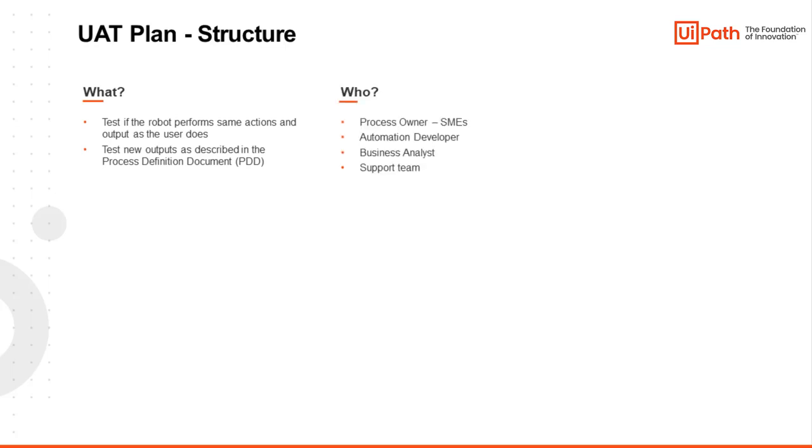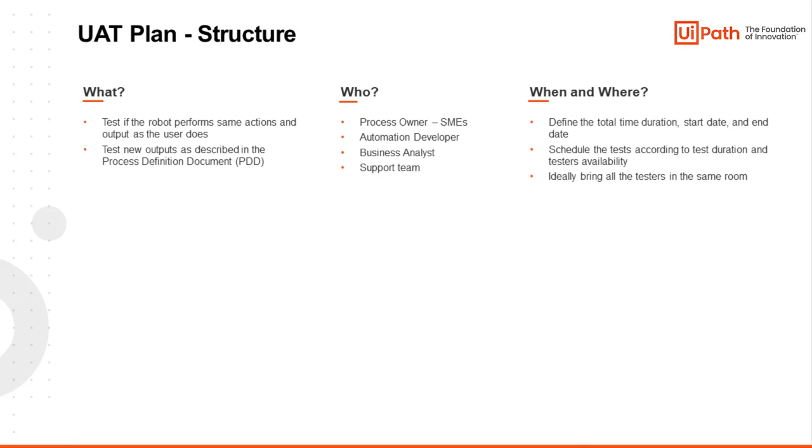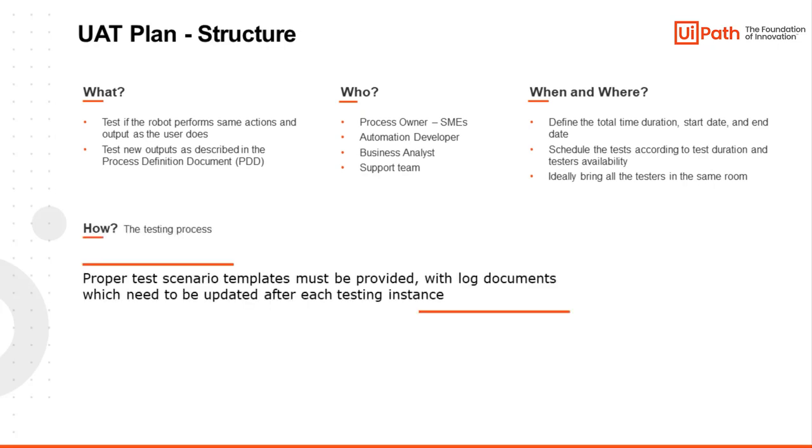It should be clear whether a dedicated UAT team exists or not, and if it doesn't, who carries out the testing procedures? How long do the tests last? The answer to that question must include the duration, as well as the start and end date, considering the availability of the testers and the required environments. How are the tests carried out and which tools are employed? Proper test scenario templates must be provided, as well as log documents which need to be updated after each testing instance.